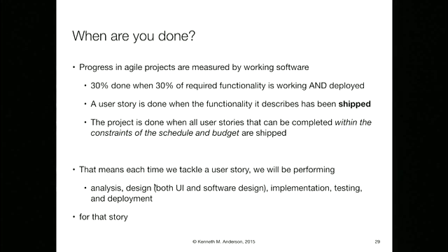And so if eventually you get to a point where your system is going to be a database with middleware and a web app on the front end, like that's your final state that you want to be at, or you've got a web service with middleware and then a database somewhere, and your front end is a mobile app which talks to it via a web service. This means that to get that first user story done, you build the database, you find the middleware and you deploy it. You create the web service that's going to take the incoming request. You build the mobile app so that it can do one thing. And it's got a UI, you can log in, you can do things,